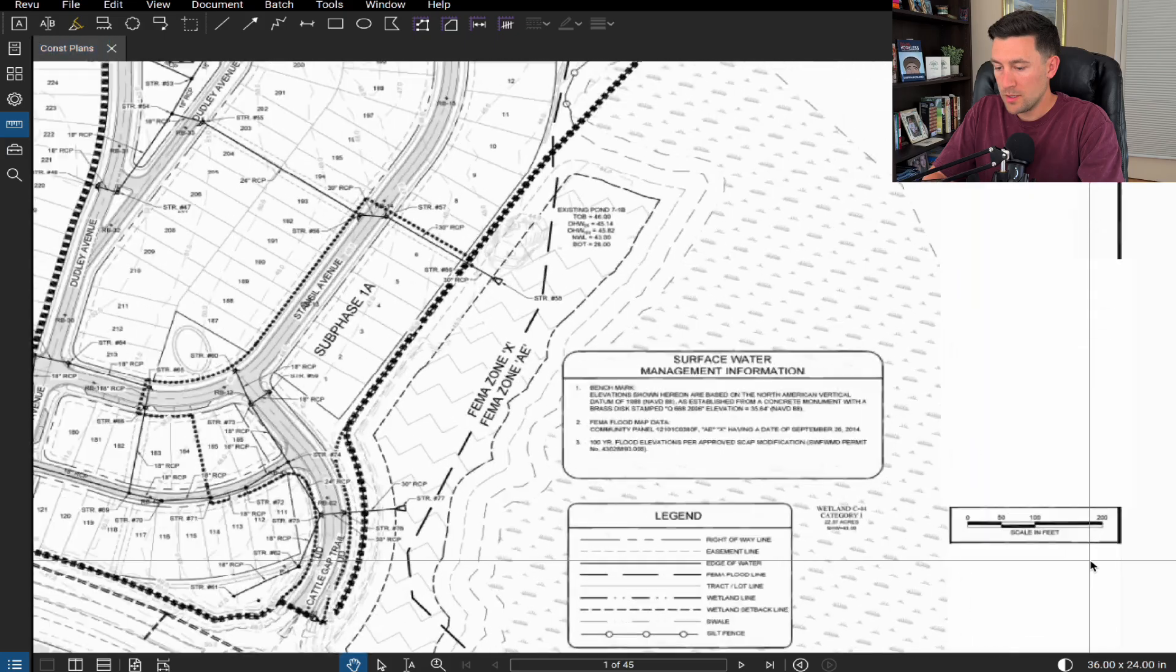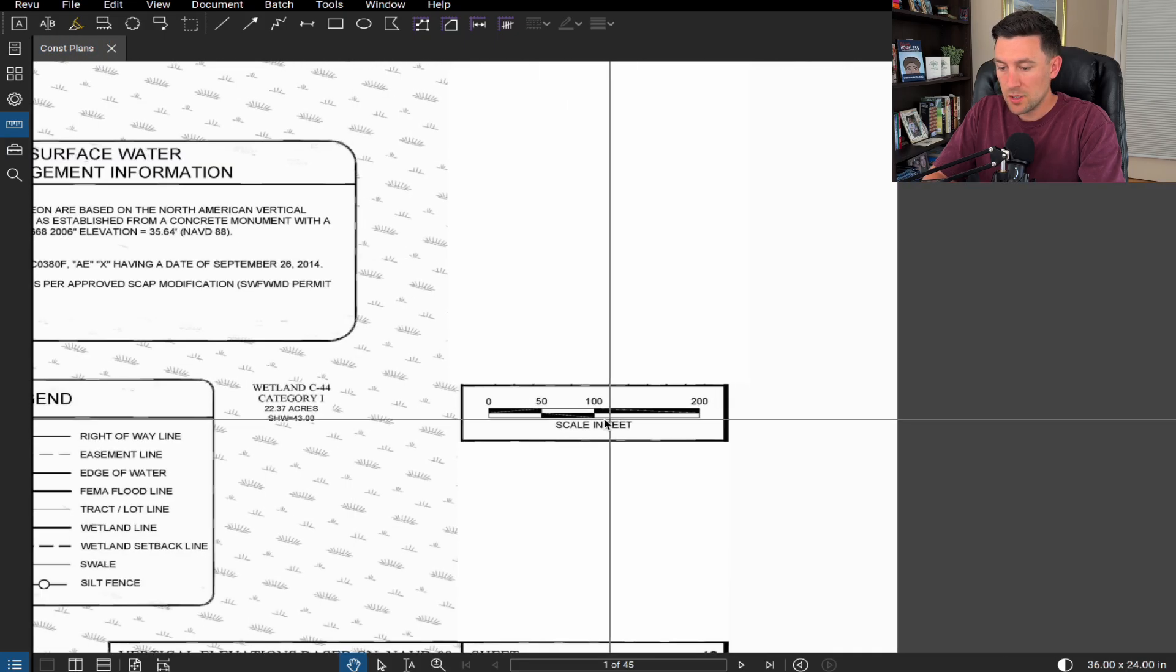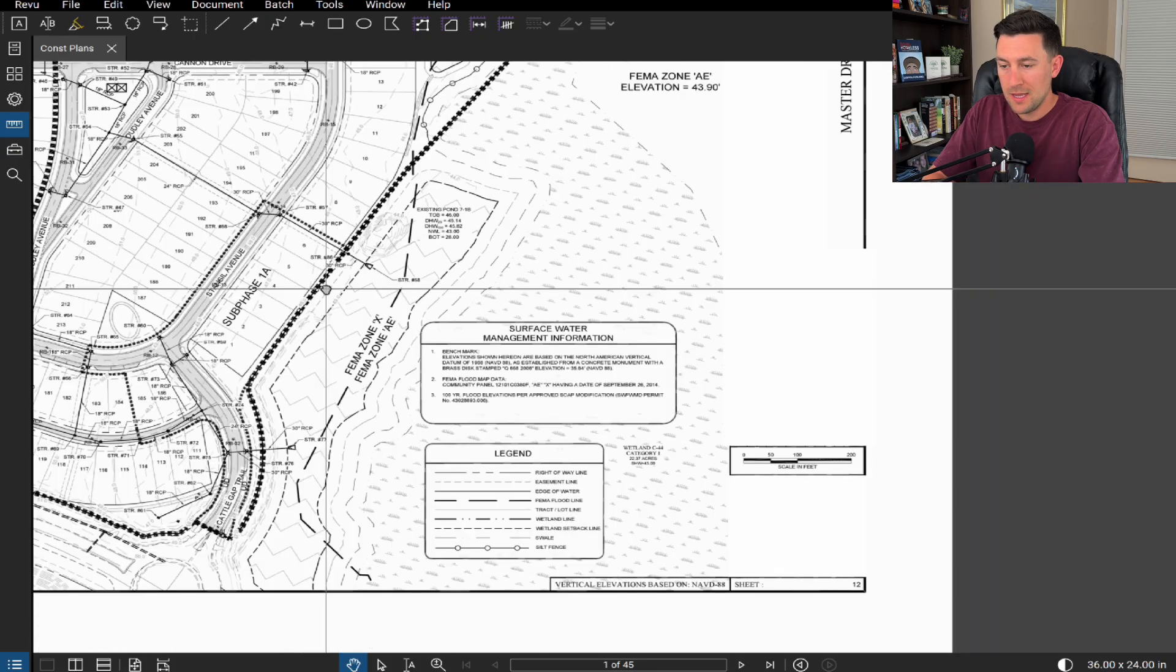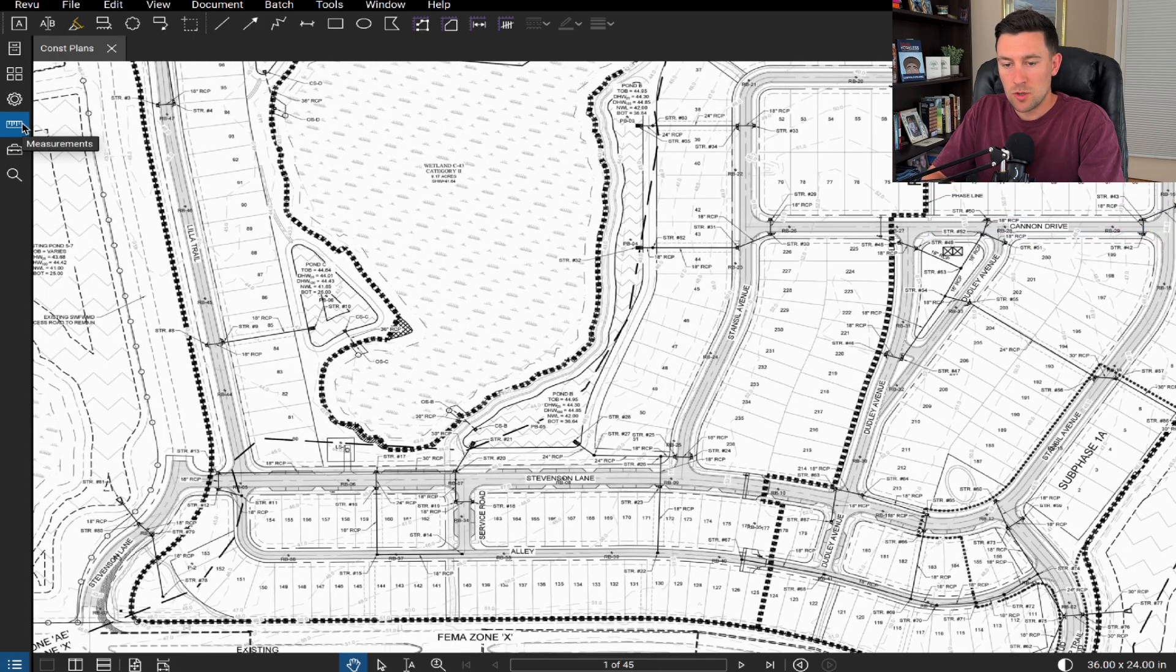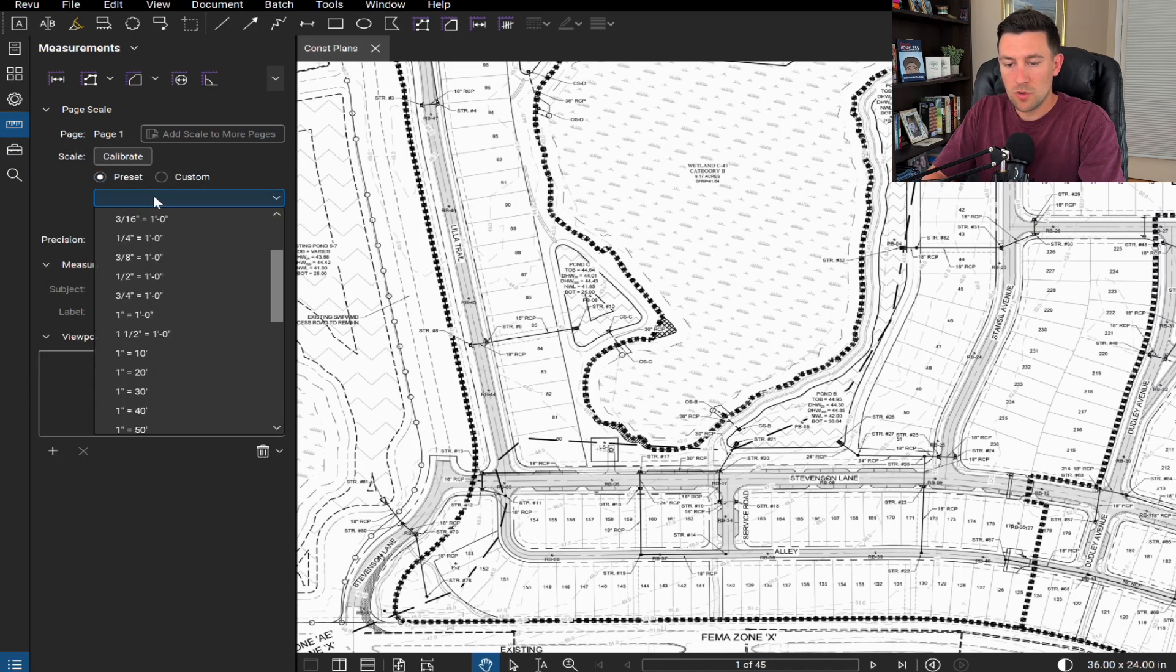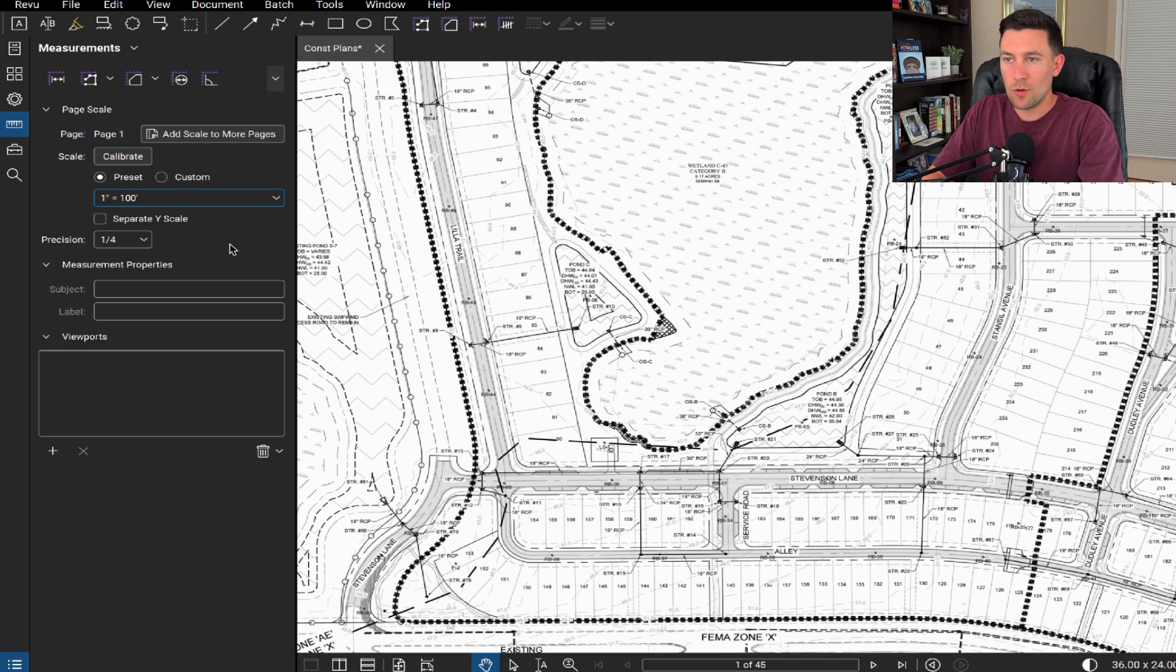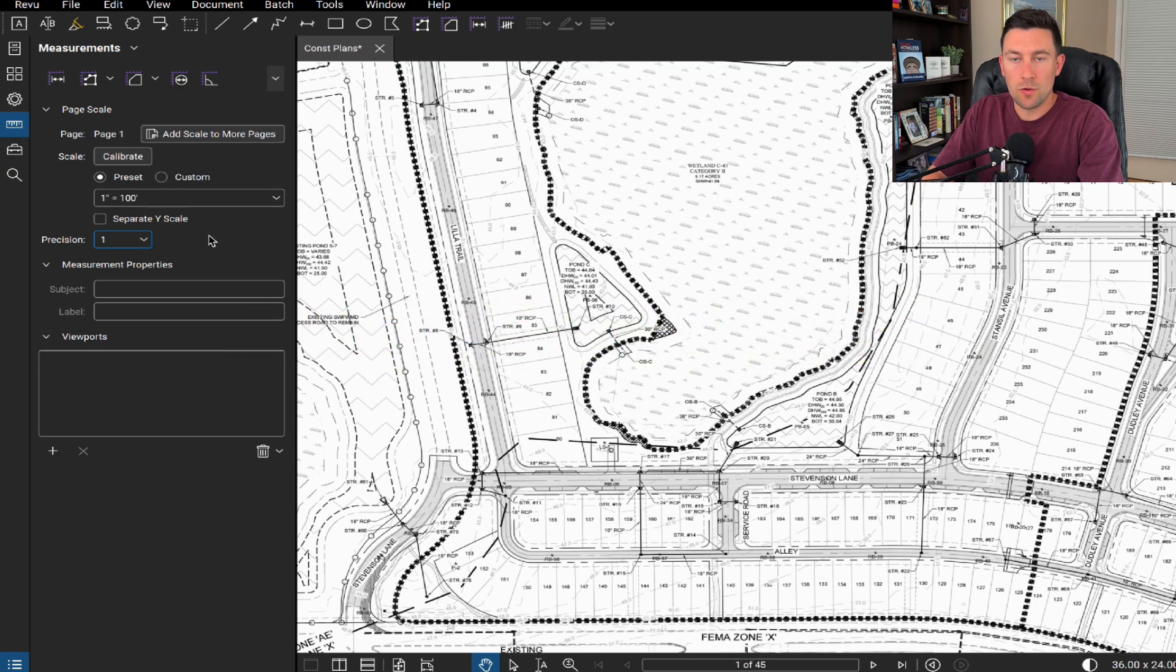So the first thing I'm going to do is I'm going to understand what the scale is of the drawing. So we are on a master paving, grading, and drainage sheet. So the scale is one inch equals 100. So let's go over here to the measurements little tool. And since it's already preset, I'm going to go to one inch equals 100. And typically for quantities, I don't really like to go to a quarter foot or a quarter inch or anything like that. I'm just going to set the precision to one. I want quantities in just whole feet.